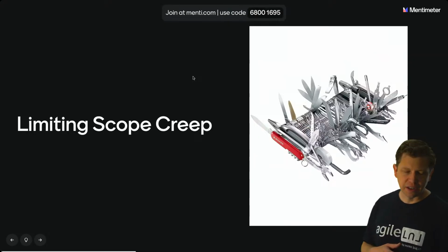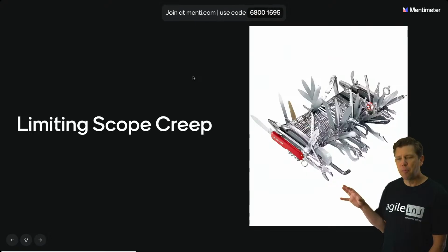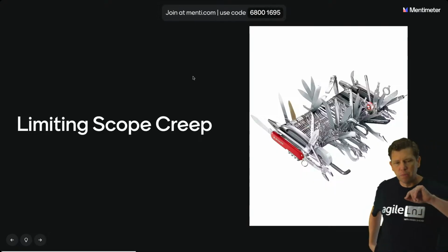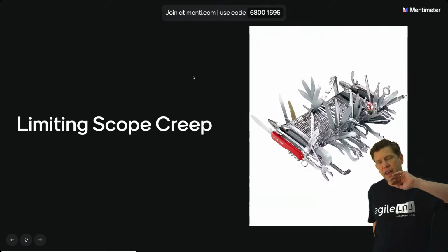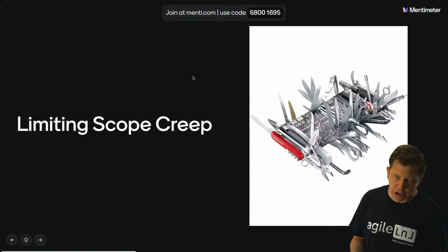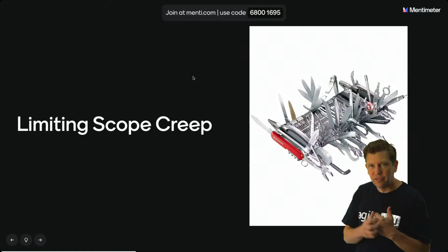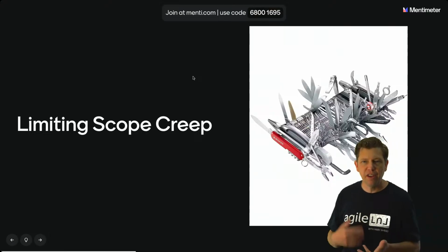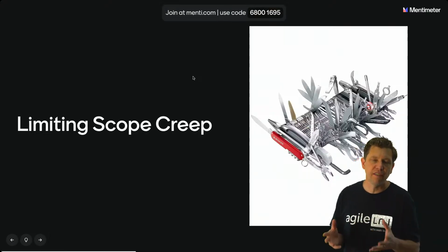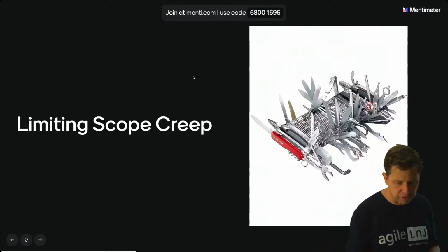It could also be something that outlasted its purpose. Yes, good point. This is where an MVP can actually help, by saying, okay, what's the next little piece that I can get information from? One thing I want to point out about an MVP is that it's not enough just to say, here's the smallest thing we think we can deliver, let's give it to the customer, and then ignore the customer and pretend we didn't hear anything when they tried to give us feedback. The point of an MVP is to get feedback. If you're not in a position to actually get feedback, learn from it, or adjust from it, you're not going to get the benefits of having an MVP.